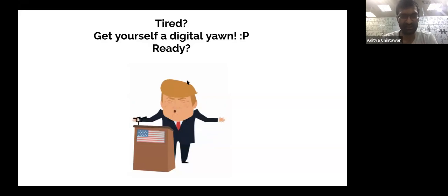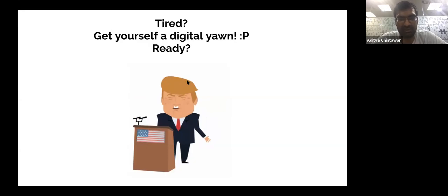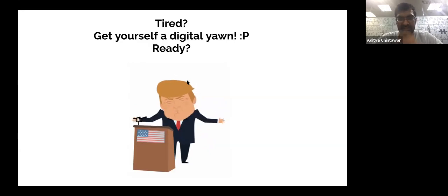For example, whenever you're beginning, you use t-shirt sizing. Whenever the people are a bit mature, you move on to functional point analysis, because now everybody starts speaking that and you have better commitment to delivery understanding and FPA. And planning poker is for when it's a very people-based estimation effort, because everybody needs to be very vocal, very cooperative while they are wanting to answer something, right? So I think it's stage-wise to the company and product, not to the internal stages.